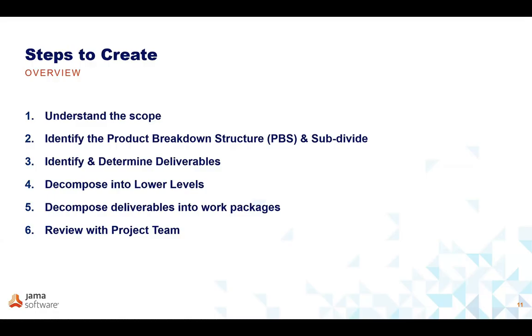And then what you're going to do is take that product breakdown structure that's been subdivided, and now use that to determine what the work breakdown structure is, right? So you're gonna focus on these outcomes and identify these deliverables, right? So the focus is supposed to be on the outcomes, not the activities needed to reach them. So it's not the to-do list.